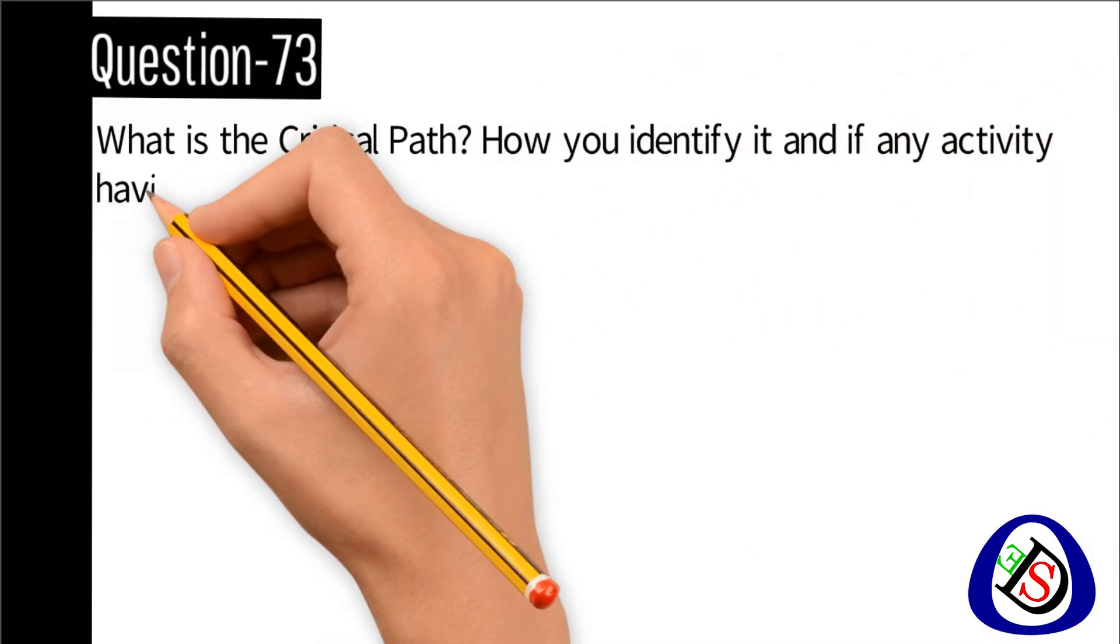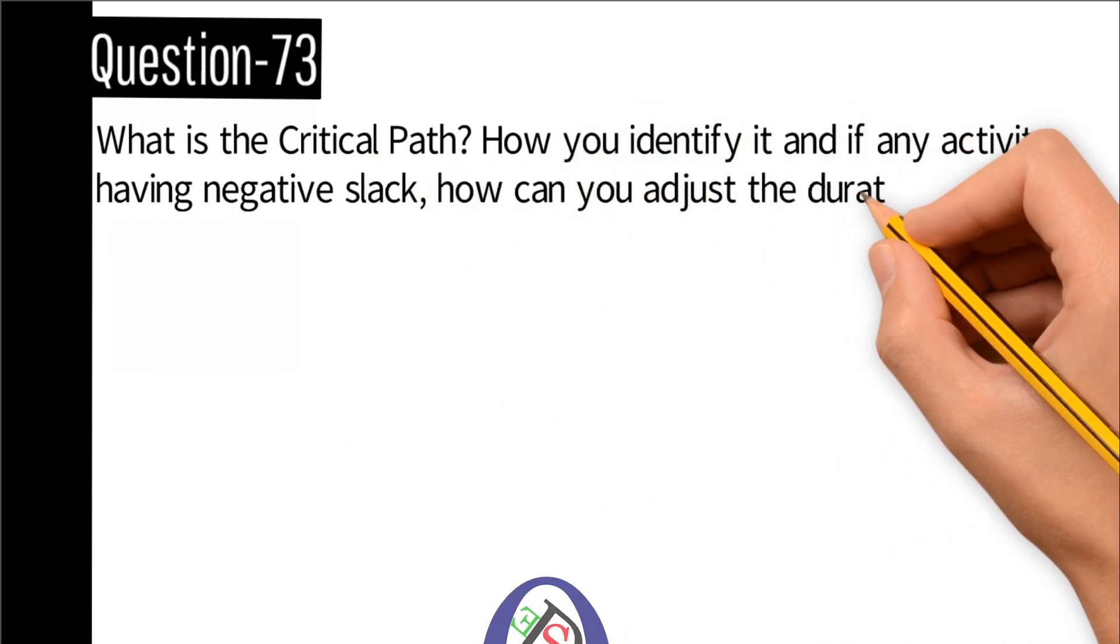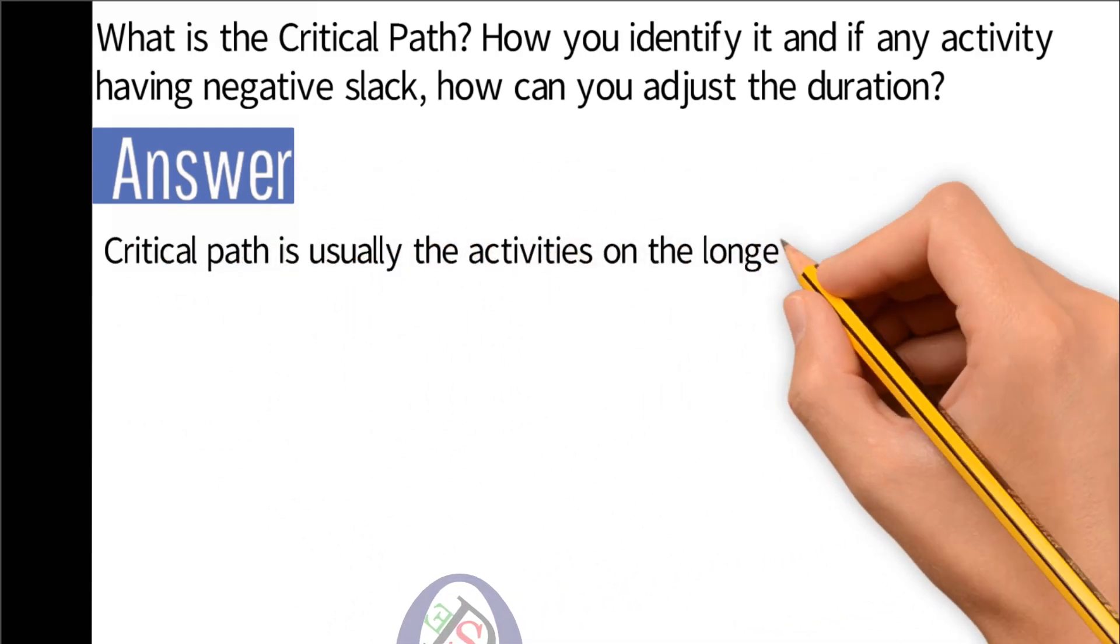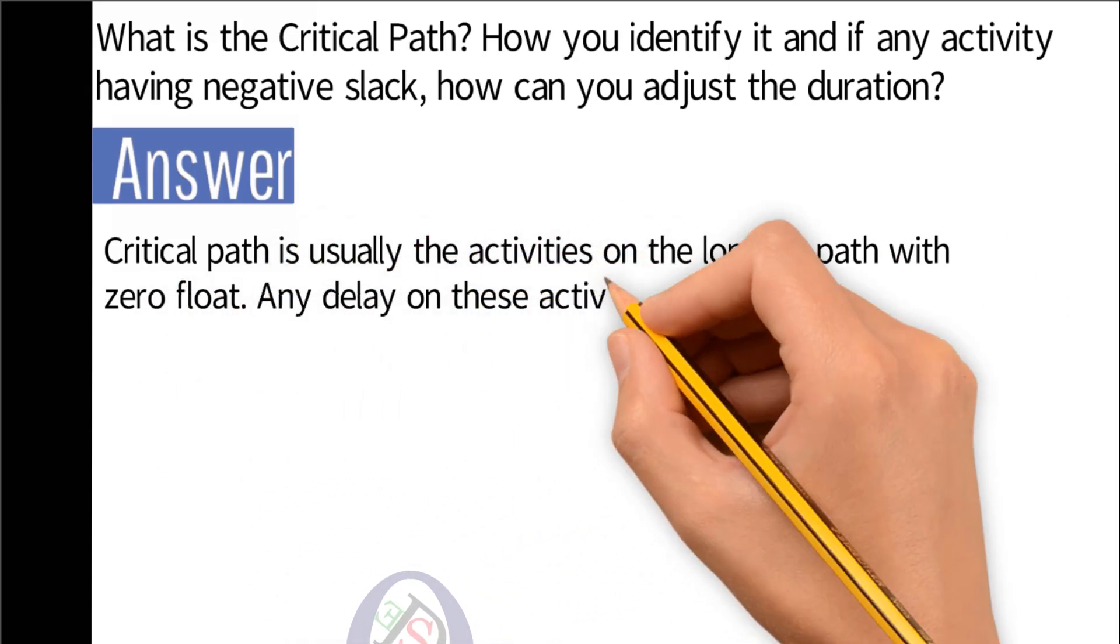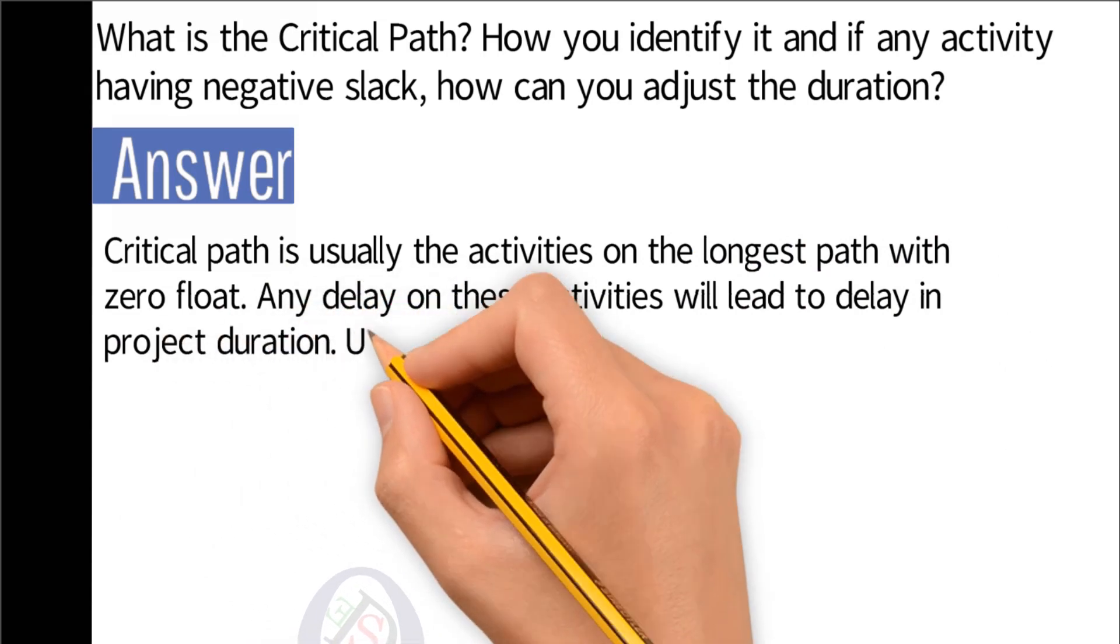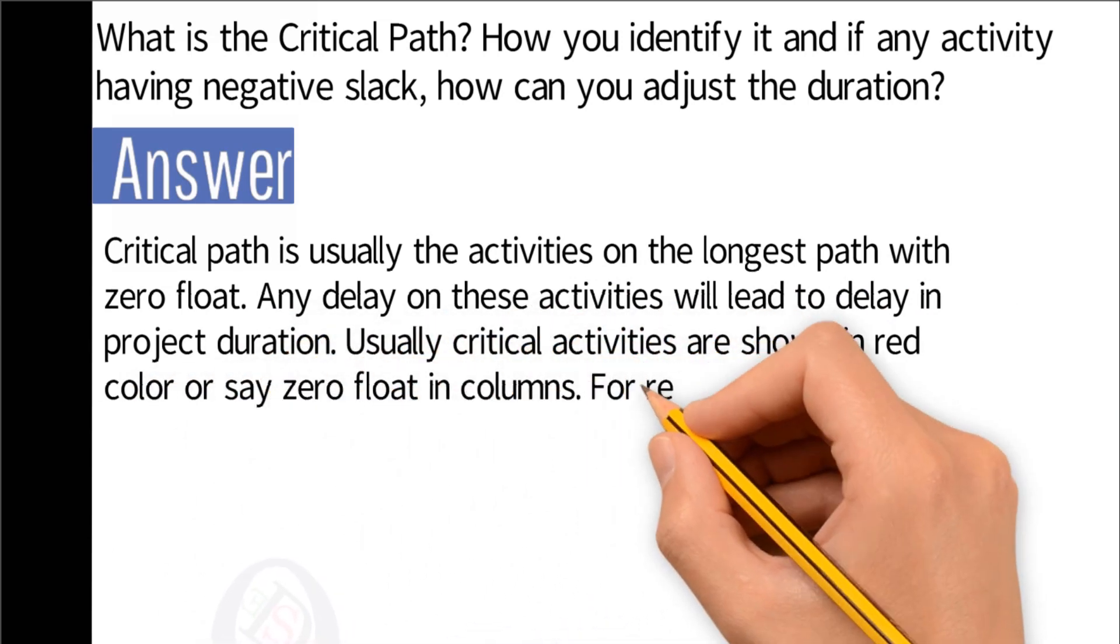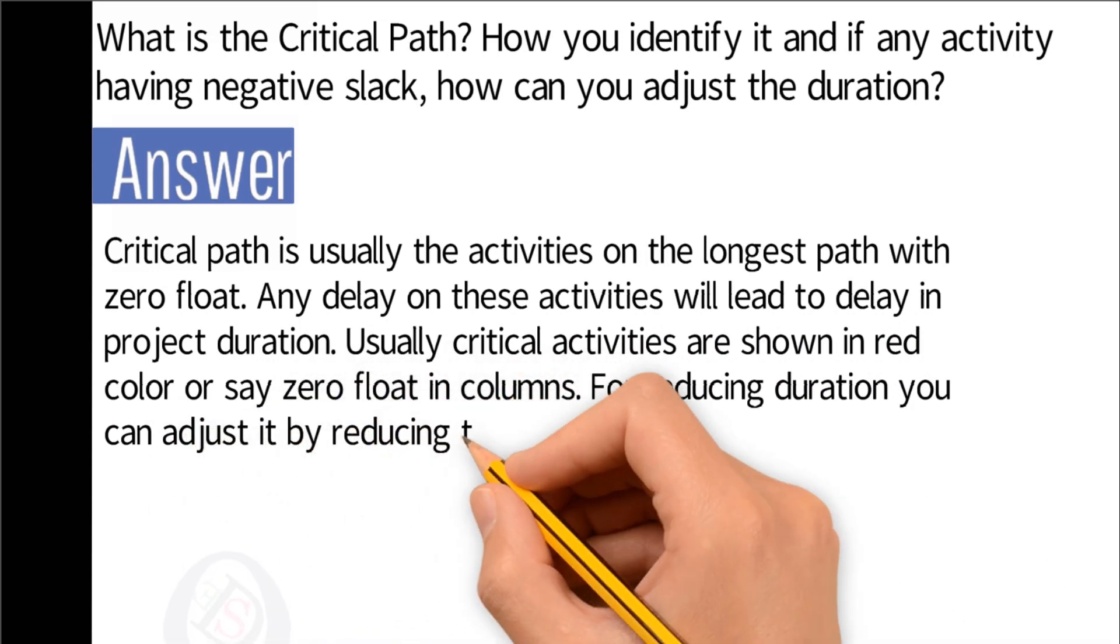Question number 73: What is the critical path? How do you identify it? And if any activity has negative slack, how can you adjust the duration? Answer: Critical path is usually the activities on the longest path with zero float. Any delay on these activities will lead to delay in project duration. Usually critical activities are shown in red color or say zero float in columns.